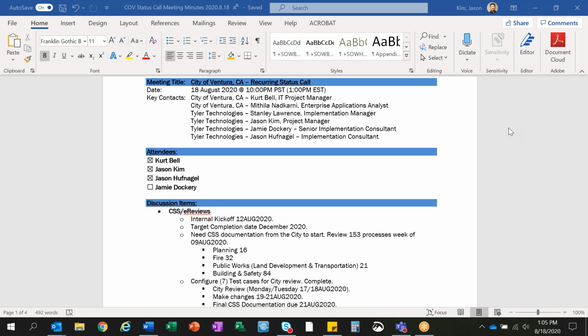For example, I understand that if CSS is done from the beginning, then build and validate and final test and training occur from an end-to-end perspective. So if there's something in CSS that we don't like that requires a front-end configuration change, it's not such a big deal because you're developing it.